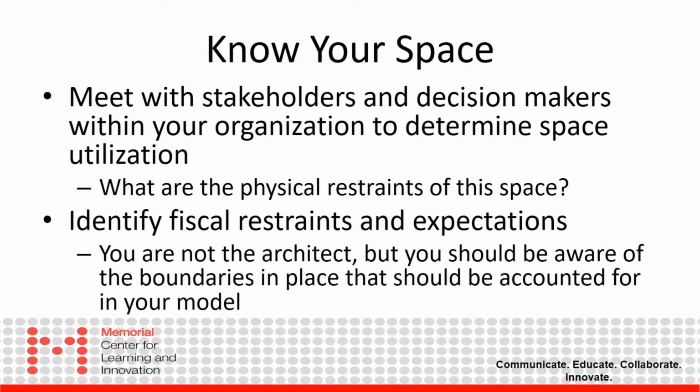What we have seen as we're building these out is that we want to make sure we're looking at some of those non-value added spaces, whether they be janitorial closets, restrooms, or hallways. Making sure, from an organizational standpoint or an accreditation standpoint, that we are building out models and giving recommendations that account for some of these physical restraints that you might see during this facility planning process.